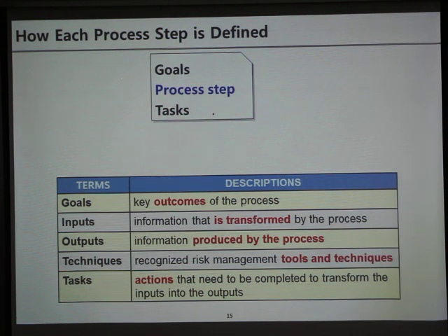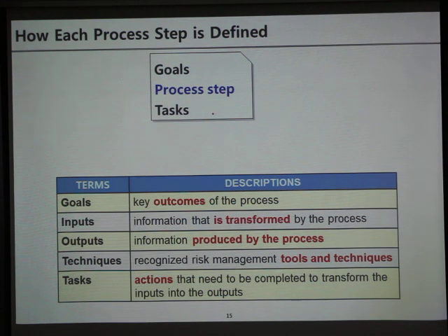We need to understand how each process step is defined. Goals are the key outcomes of the process. For instance, the process goal for the identify step is to identify both the threats and the opportunities facing the activities.